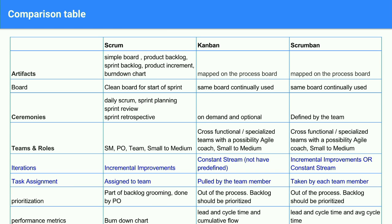Teams and roles: most say you should have some kind of Scrum master or agile coach to lead the team. In Scrum, very clearly defined roles — product owner is essential, without it things get complicated. Scrum master, at least to start, gives structure to the sprint, with the eventual objective that everyone is self-managing. For Kanban and Scrumban this is optional, but having an agile coach is recommended. Iterations: Scrum has defined sprints; Kanban as you wish; Scrumban maintains iterations with a lot of flexibility.